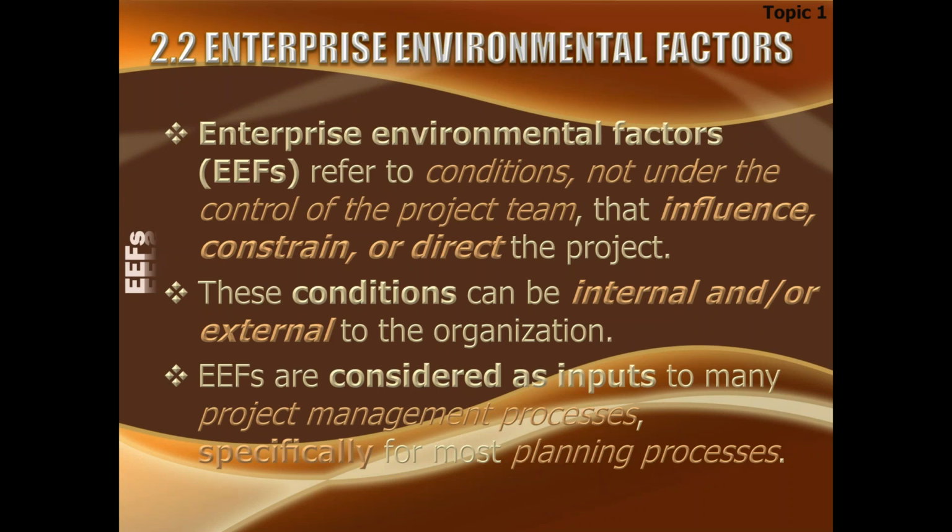And I will also be consulting organizational process assets when I'm developing a charter. What is the format of the charter? What are the guidelines of the organization about writing the charter? Who will write the charter? Who is supposed to sign it? Who is supposed to receive it? What are the actions to be taken? So all these policies and procedures already exist and they are to be followed.